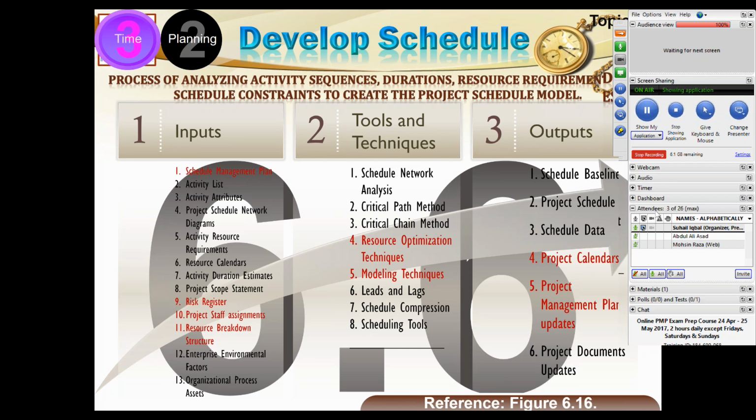Now, what is the protection a project manager can build? Project manager has no allowance in the critical path. Critical path activity, if delayed, will delay the project. He does not have any float on the critical activities. If he tries to build a float or extra time, that will be beyond 59 days. Therefore, that will be more than the critical path. So that is not possible. So whatever he has to do for his own protection and the protection of the project, he has to do within these 59 days. So maybe he does some padding as well.